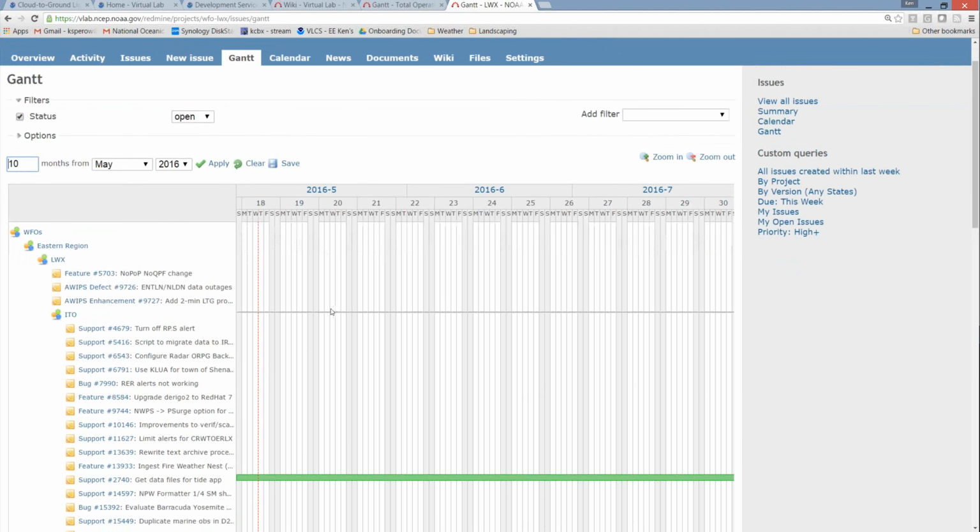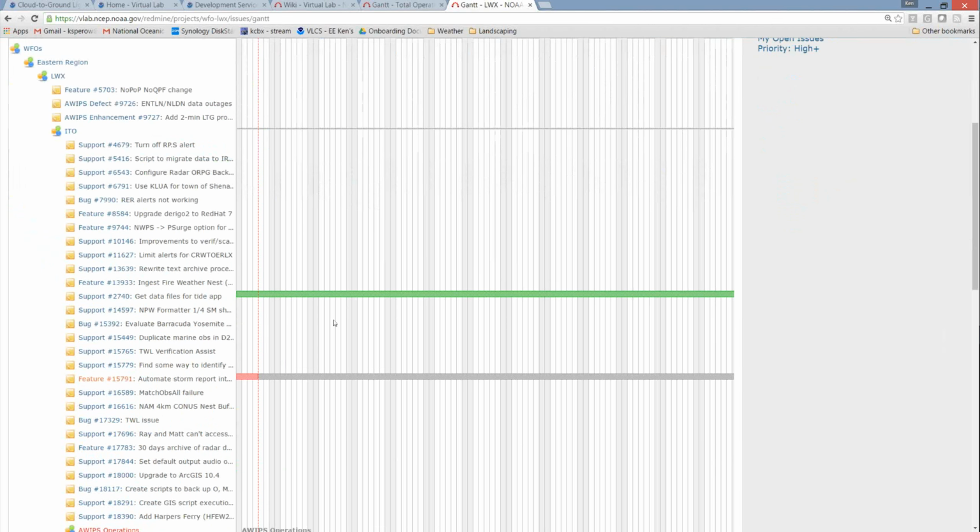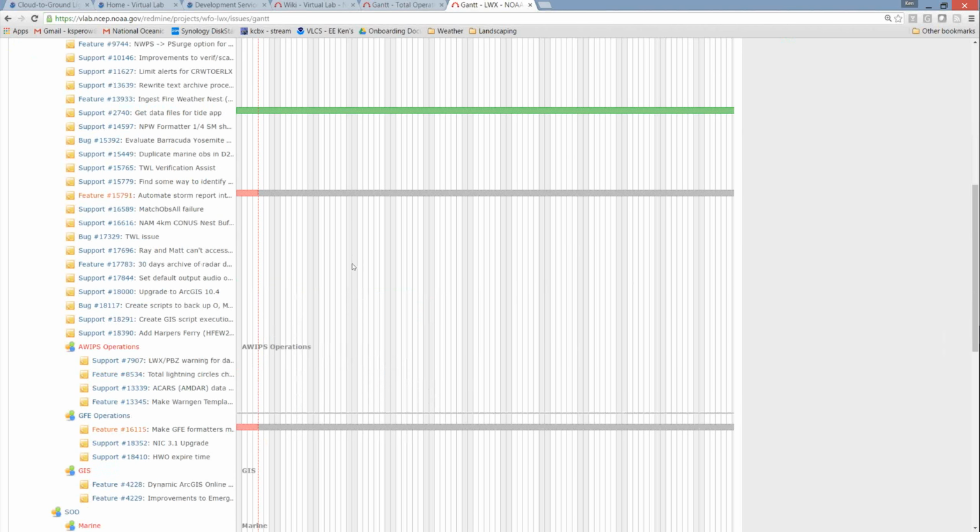It basically looks at the issues, start dates, end dates, and it also allows for relationships. And I'll show you a different project where they're really using that a lot. So you can say that one issue depends upon another, it must follow it, or it's blocking another. You can just give general relationships. And that's then depicted within the Gantt chart, which is a nice way of doing things.